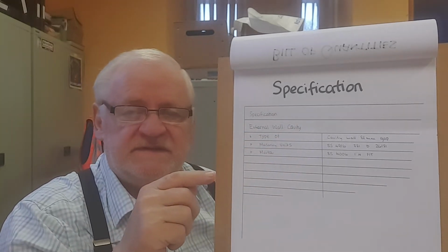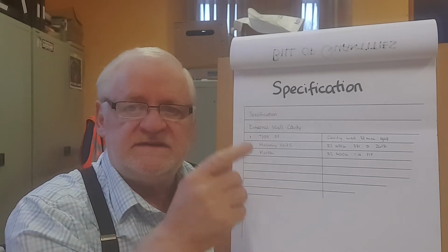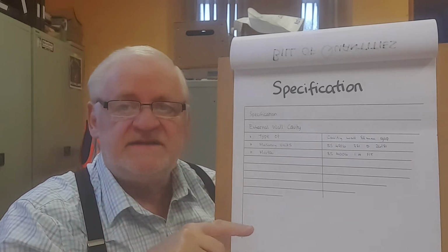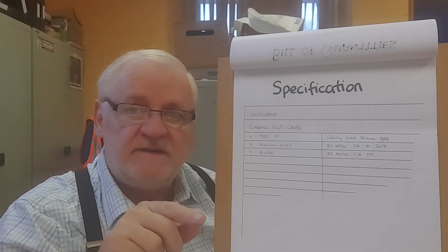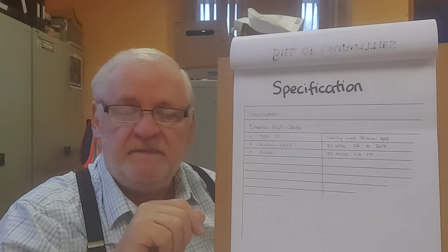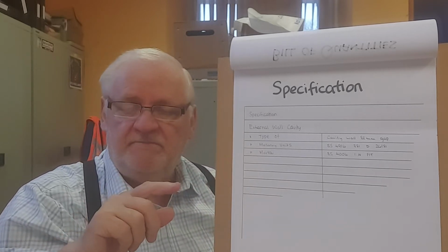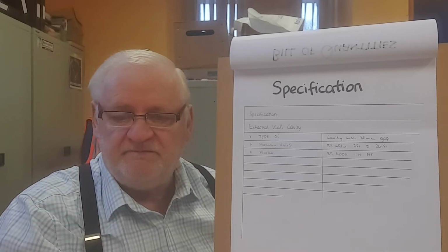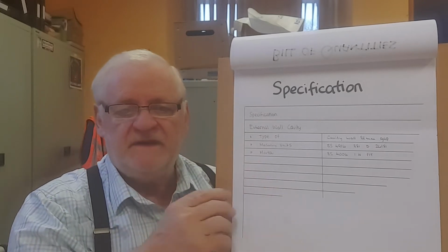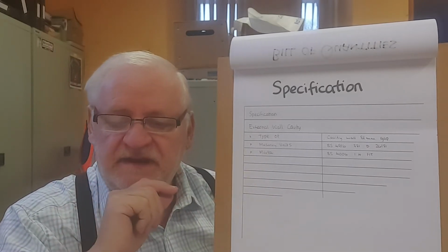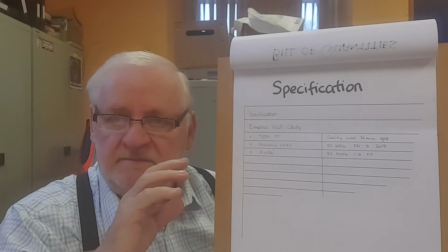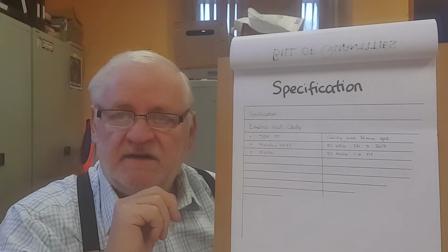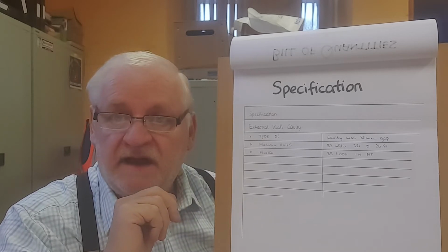It's very important that any contractor doesn't give a quote until they know exactly what they're quoting for. It's no good you giving a quote for one thing and somebody else giving a quote for inferior materials. They then can be cheaper. We need to have quotations that come in which are for the same material and the same standard of workmanship. Okay, so this is the specification. So we've already described at least 3 different types of important information, paperwork, that enables the building to be planned.